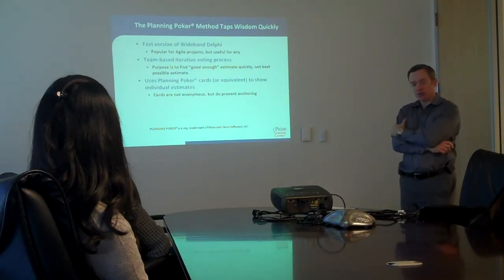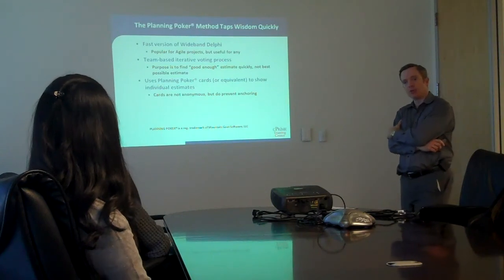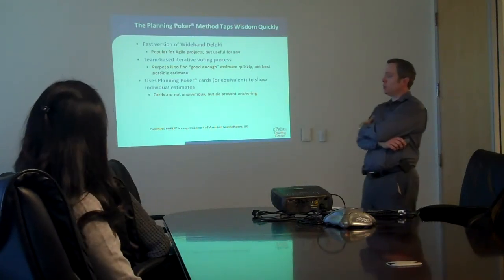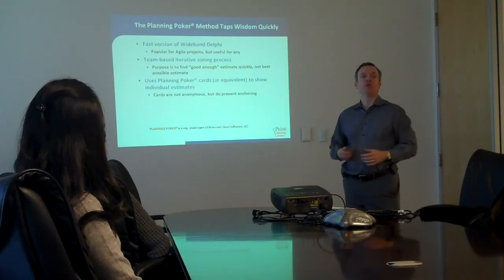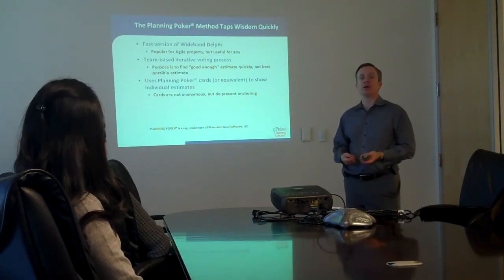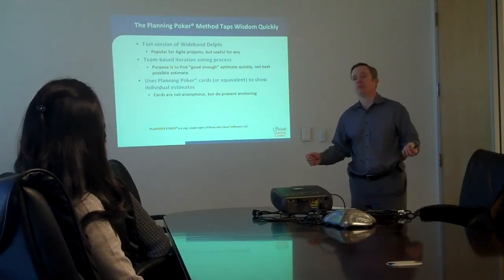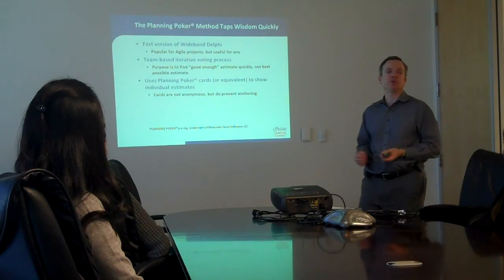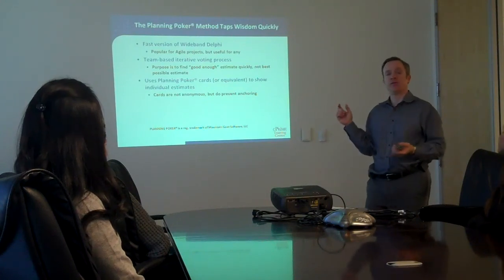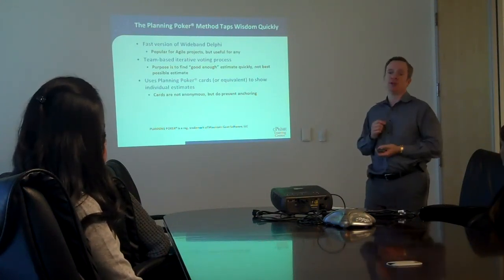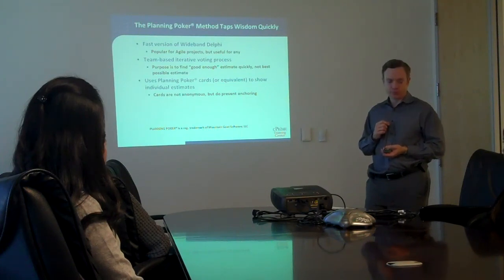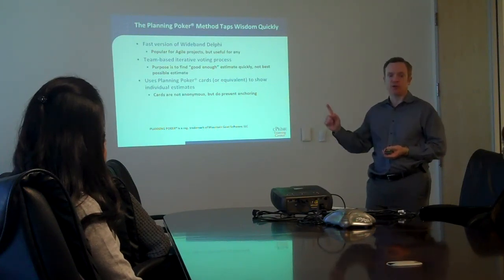The advantage of cards is that while they're not truly anonymous, we nevertheless have the ability with them to prevent anchoring bias and anger. We ask a group of people what they think, ask them to pick a card with a number but not show it, then ask them all to show their cards at the same time. It's too late for them to change their minds to match what they think of as the expert. We need to pause for a second, because the speaker forgot to bring the cards in.